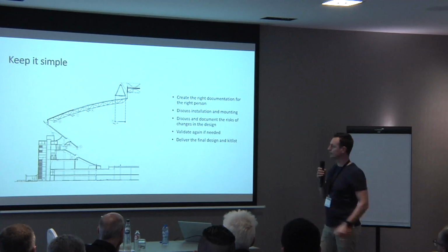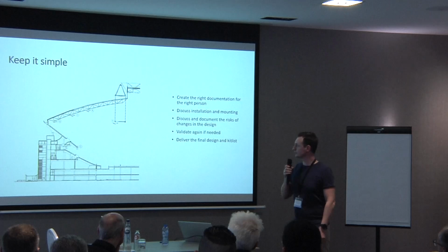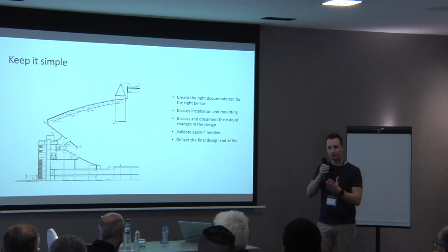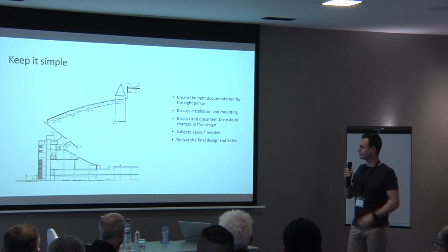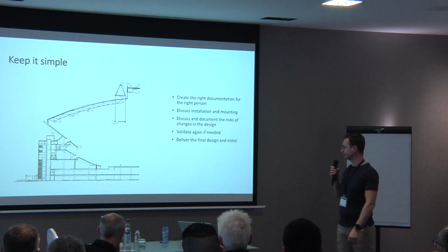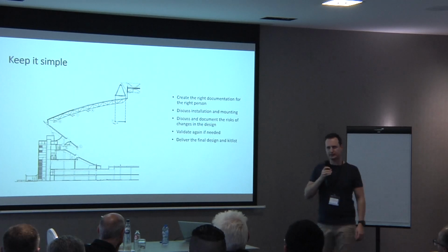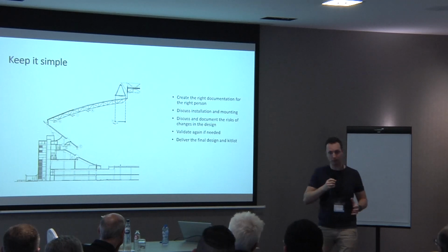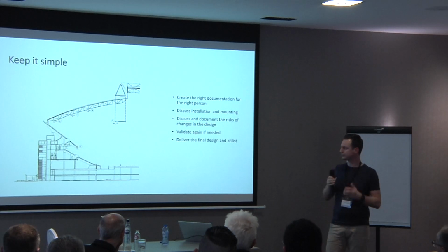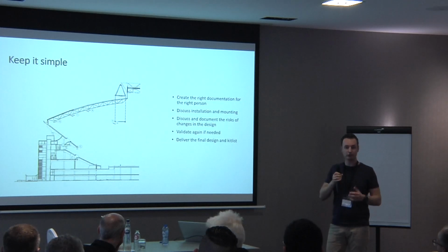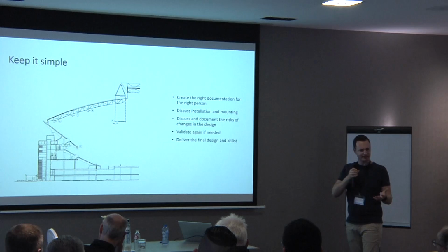This is just an example of how we deliver documentation, so the installer can easily see how to adjust the antennas to the right angle, and have a good overview of the situation. What we also did, and it's really important, is to go together with the installer to see how they do the installation, not for all the APs, but for some of them, to see if they understand it correctly. Because if they go into